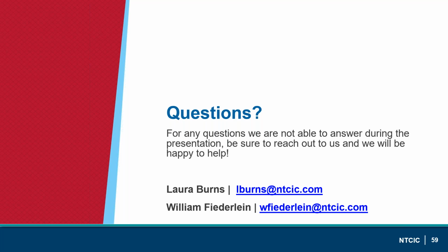Next question is, what is the typical timeline to close with a historic tax credit investor? It's a good question. So in terms of timing, the most important thing is that the project be in a position to close. So this means that, one, you're on the National Register, you're a contributing building to a historic district, you have your Part 1 approval. Two, you have your Part 2 approval from the NPS, which indicates to the investor that, assuming you follow along the plans and specs that have been approved by the Park Service, it gives the investor comfort that you're going to qualify for the historic tax credit.